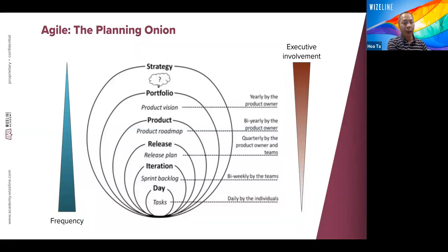And that is the sprint. An iteration is the sprint in Scrum. If we are talking about the Scrum framework, an iteration is a sprint. And then every day during the Scrum, we have the daily planning. Daily planning is an activity that we normally call the daily Scrum. Actually, the daily Scrum is not really a planning session. It is more like we share the planning, because the daily planning is done by individual members of the team. Everyone in the team will have their own planning for that day. So they bring it up into the daily Scrum to share that today I'm going to do something,